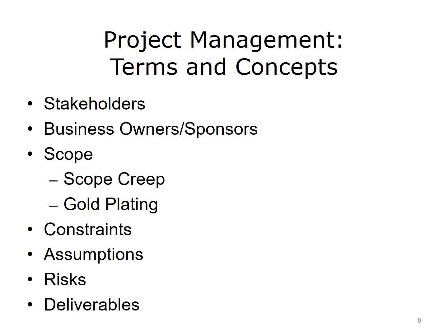Which leads us to our next term, scope. Scope defines the boundaries of a project, such as schedule, financial resources, objectives, and staff. "Scope creep" refers to the tendency of most projects to shift boundaries as the project moves forward, and professionals often use the term "gold plating" when they speak of adding needless details to a project. Keeping a watchful eye and a firm hand on your project scope will help you avoid such project roadblocks as scope creep and gold plating.